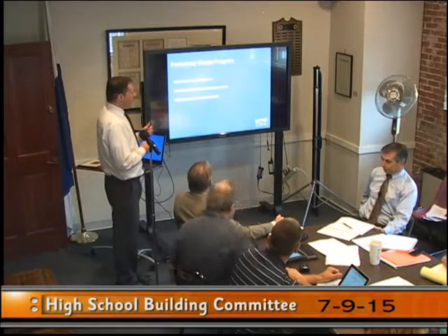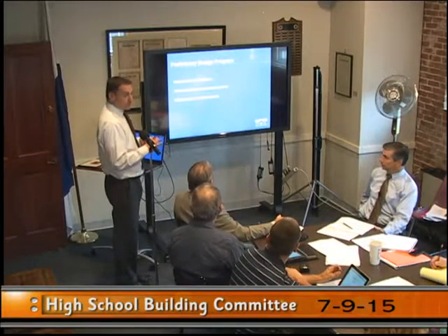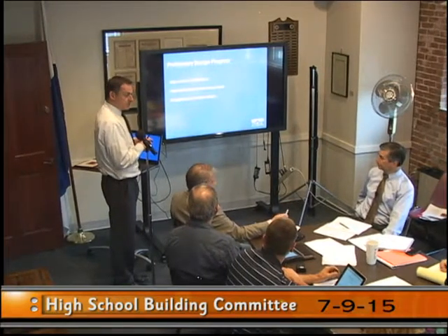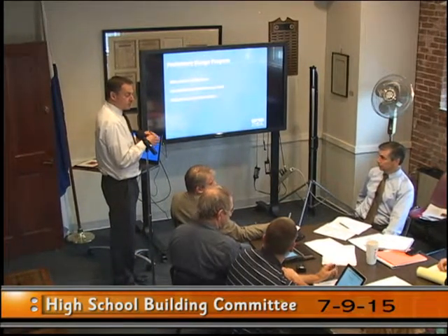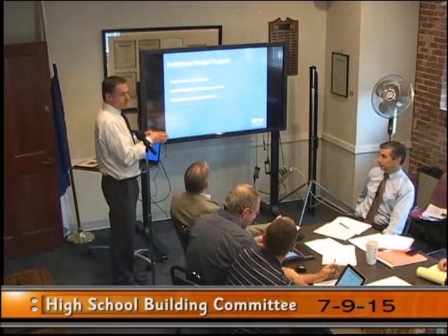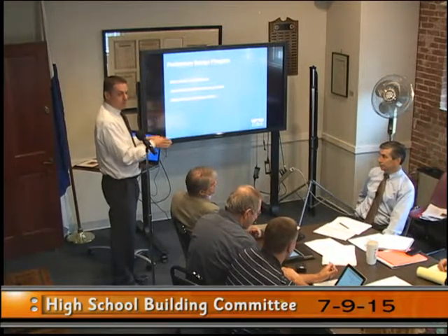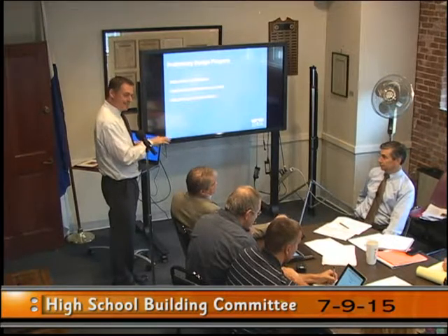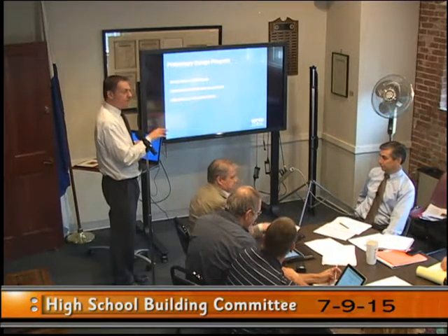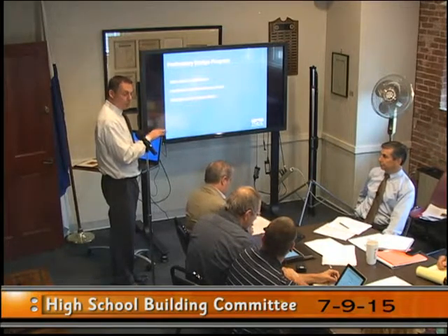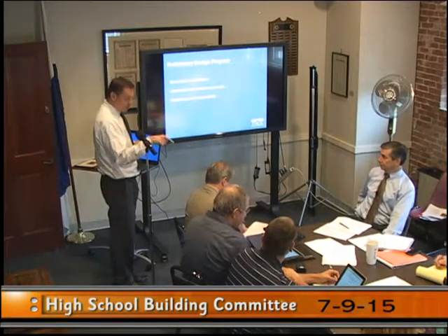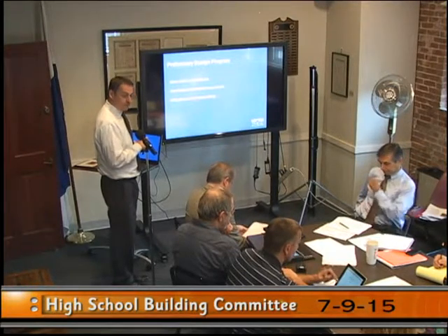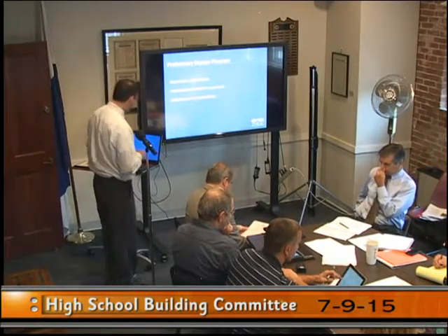And then identifying the preliminary alternatives, which we've had a little bit of discussion about this evening. It's sort of setting up and telling the MSBA, these are the options that we're going to look at during the next phase of the project. We don't get into it in detail for the preliminary design program. We just tell them what we're going to be investigating, and that family of options that you see in your packet this evening identifies some of the options that we're going to be looking at.